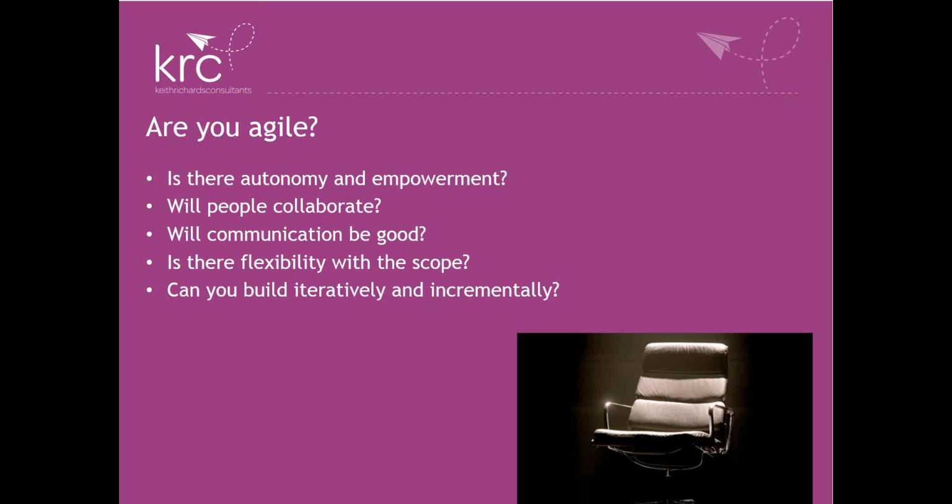And remember, a lot of organizations at the moment have got their Agile to such levels that they're dealing with daily deliveries. So how Agile are you? Or is it really quite linear and quite waterfall? And one quick tip I'd give you here, which we see a lot, is a lot of people say, yeah, we're iterative and incremental, and when you analyse it closely, it really is just a phased waterfall, maybe a 2 or 3 phase waterfall approach, and it's really very linear.